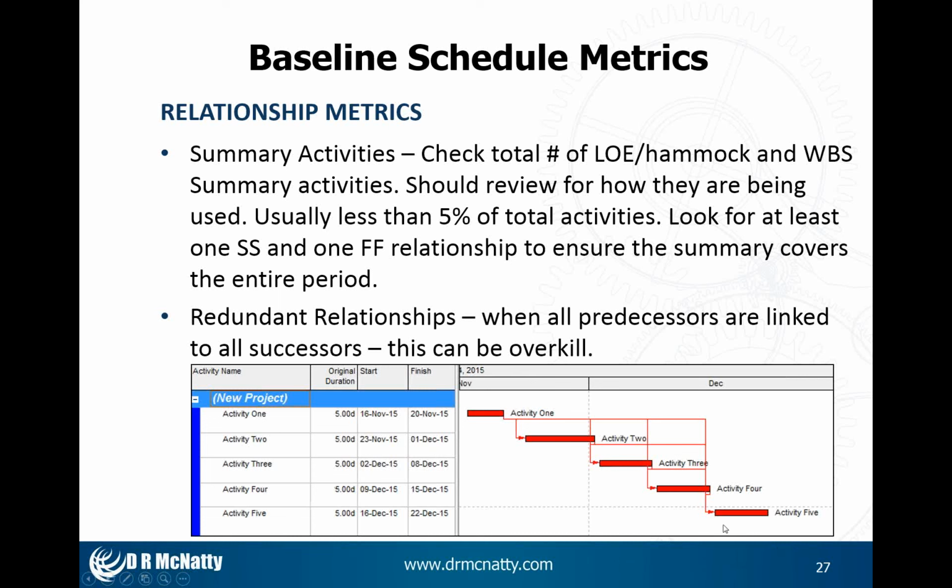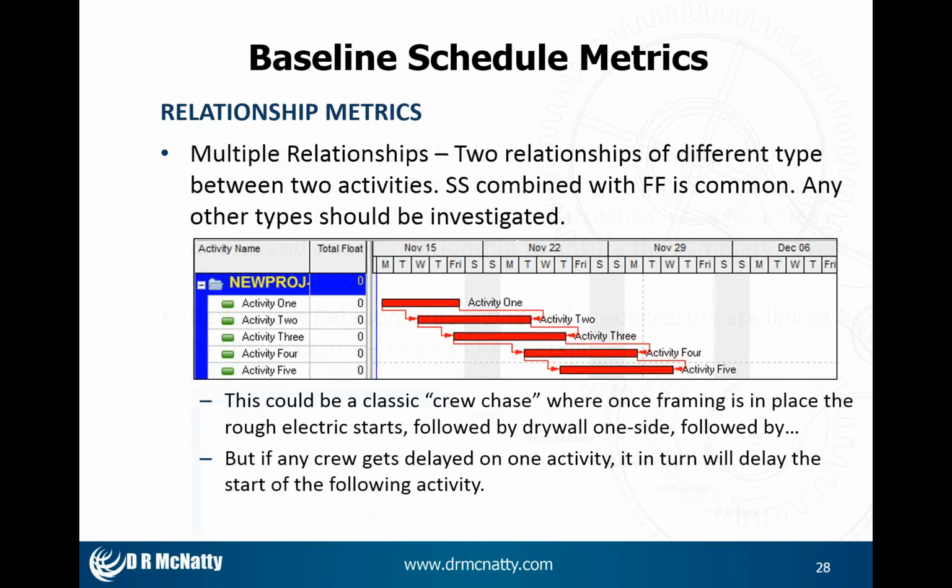unnecessarily. I mean, the way that most scheduling tools work is if activity 2 doesn't complete, the logic, if you use retained logic, still flows through to activity 5 and will push out activity 5 even if activities 3 and 4 are complete. So I really don't need that redundant logic, as long as I use retained logic as my calculation mode in P6.